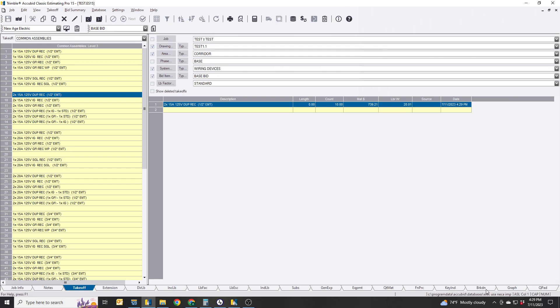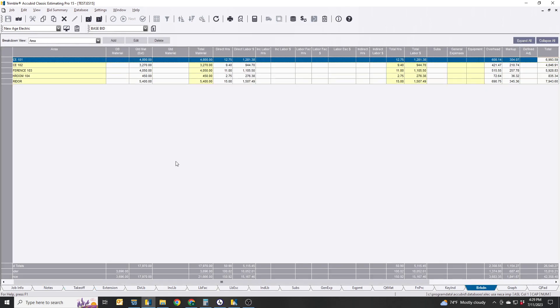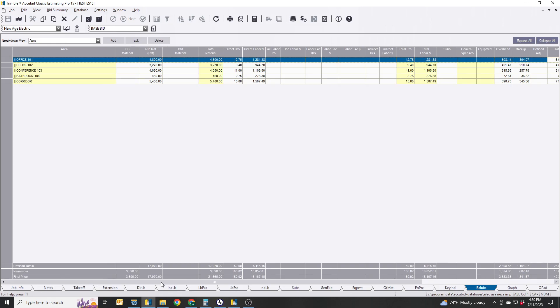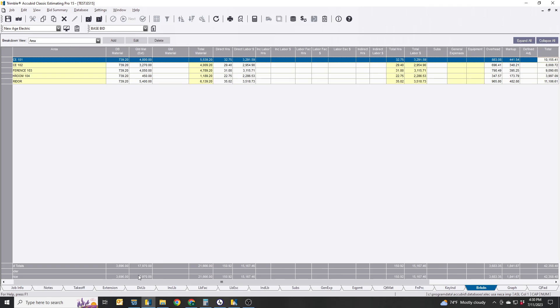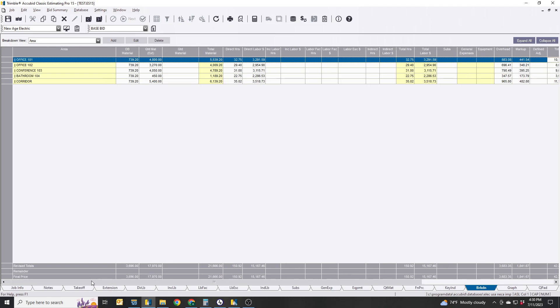Breakdown. Now if you're going to Breakdown, you're going to see that there's things that have not changed yet. There's going to be at the bottom a remainder. What that means is it hasn't been allocated yet. You have to basically do a reload.